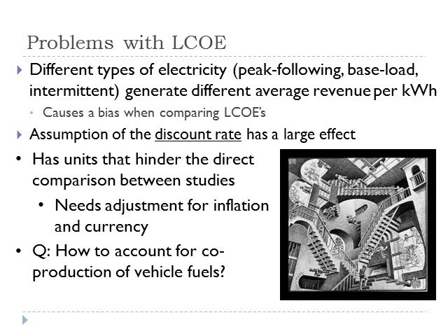Okay, and the other thing is it's got units that are problematic, I'll just say. We've got dollars per kilowatt hour. Sometimes people forget to put what year dollars. Then if we want to convert that, we have to look into inflation, let's say if you want to take it from 2012 dollars to 2007 dollars. It also makes it tough to compare if you're given something in euros or pounds per kilowatt hour, so it makes it a lot harder to compare projects in one country to another.